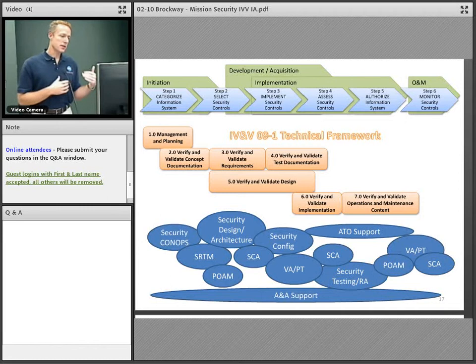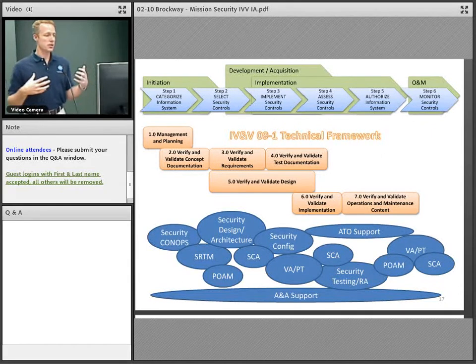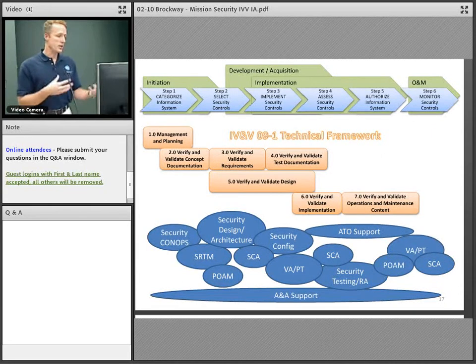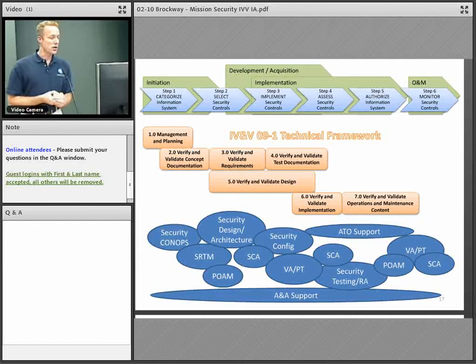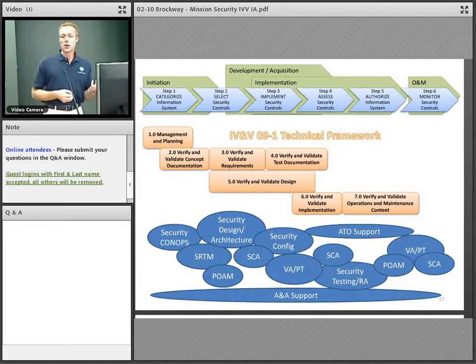All that is identified, and the risk is identified, and then that allocation to, say, HWCIs and CSCIs will have a one-to-many-to-many relationship. An independent assessment can be performed simply on just even the requirements phase to determine, is that mature and complete and consistently applied.